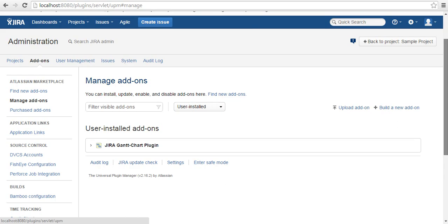Now Jira in itself, as a definition, is an issue tracking and project management software. And when we talk about project management, the question that comes into our mind is whether it allows you to create a project schedule, the way MS Project allows you to do that. For example, you create your tasks, provide the estimates and the resources, and put in the dependencies. It will give you the planned start and end date of each task and the whole project.